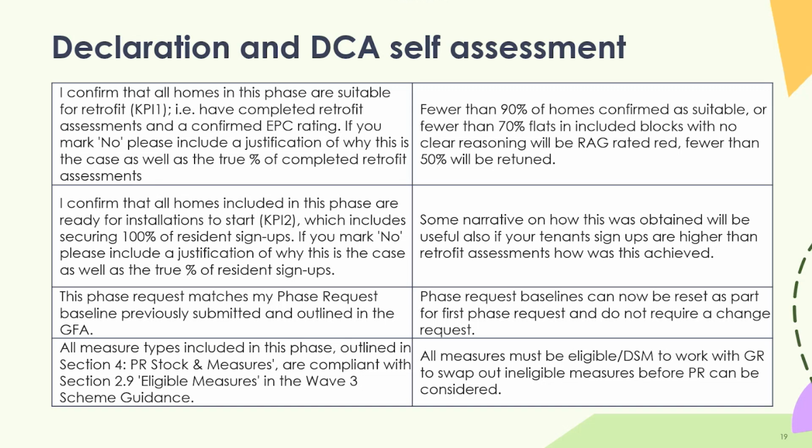If you are then making major changes following submitting that phasing baseline, other than moving properties between phases, so if you're adding more phases, if you're changing dates dramatically, or if you've got anything that will impact financial year spend, that would then require a PCR to go through, and the phase request, if you submit it at the same time, would be put on hold until the outcome of the PCR.